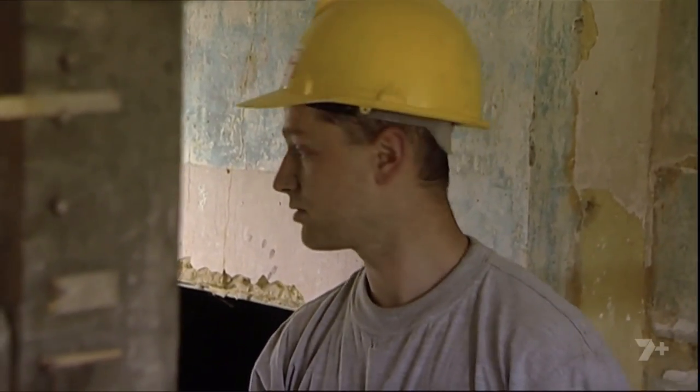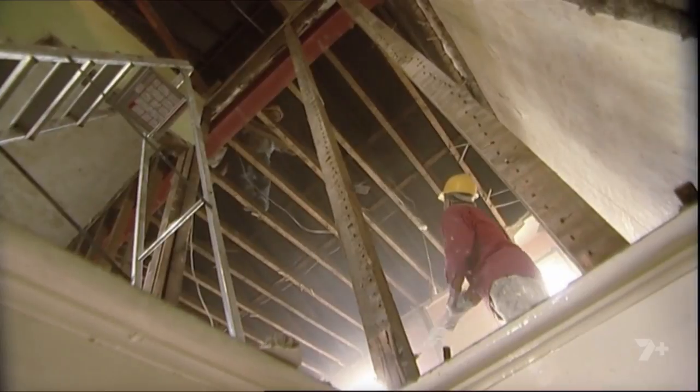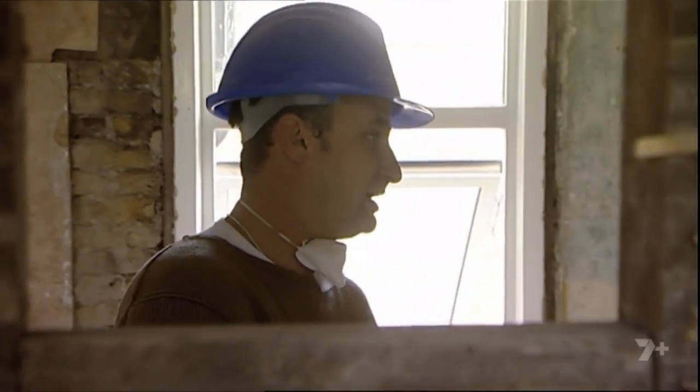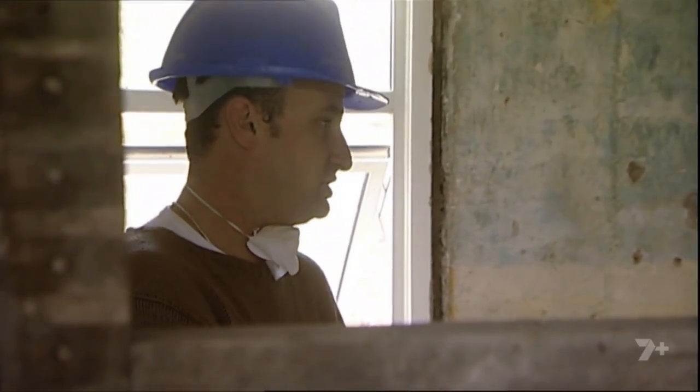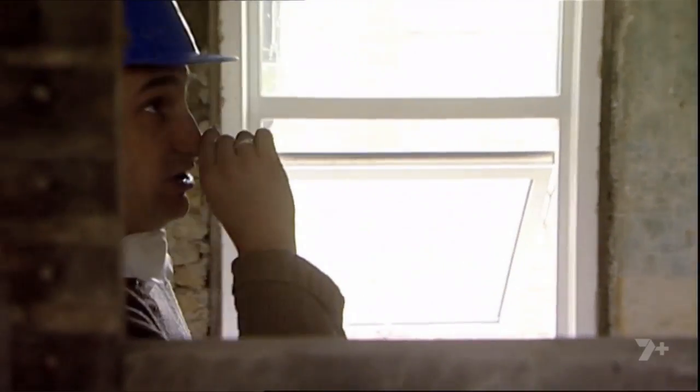Yeah, it's not much doing in that floor, but the main thing is a roof, yeah? It's gonna take about, altogether, build it and cover it, about 2 weeks. That's going to be the crucial bit, because once we've got the roof on, then obviously all the internals will start, and we'll start being able to decorate. We'll have to make sure that, structurally, it will be fine downstairs, because the steel work will be in here.